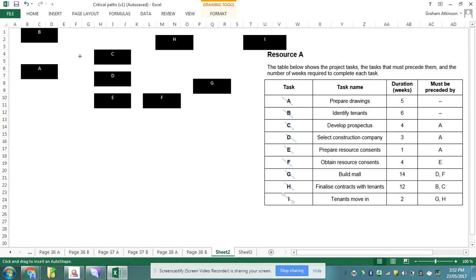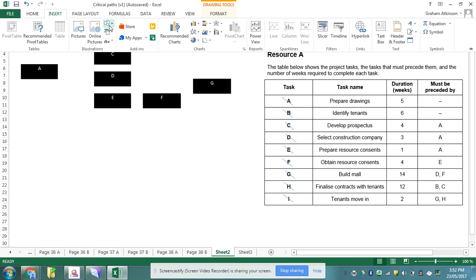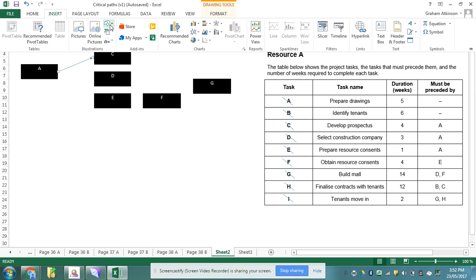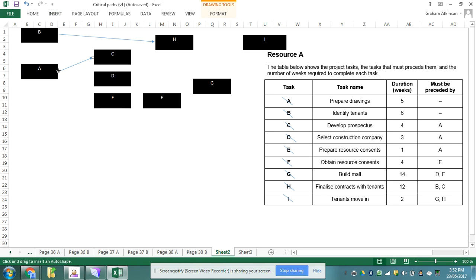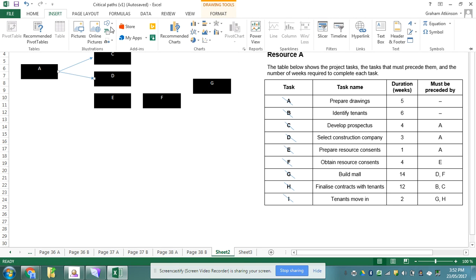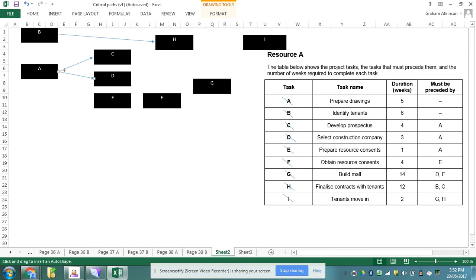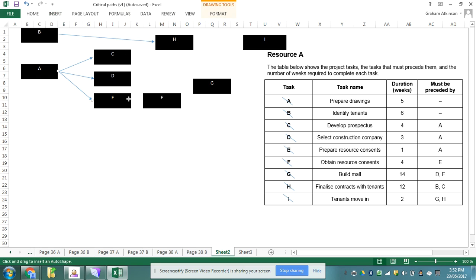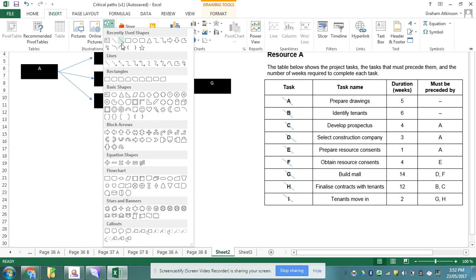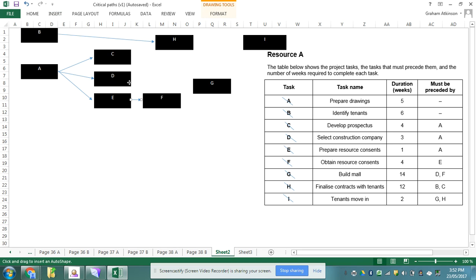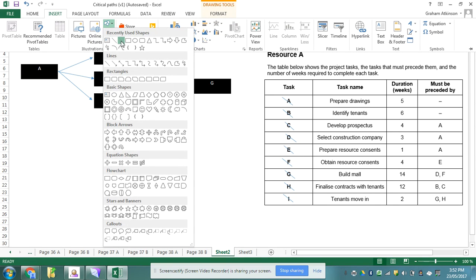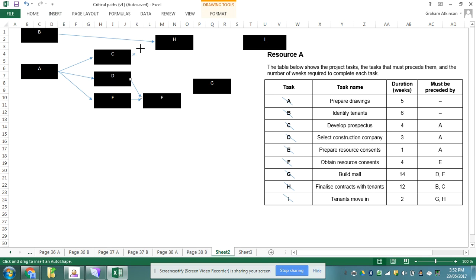So if I was to do this I'm going to draw myself some arrows. So task B goes to task H. Task A goes to task C. Task A also goes to task D and task A also goes to task E. Task E goes to task F, but also task D goes to task F and task C goes to task H.